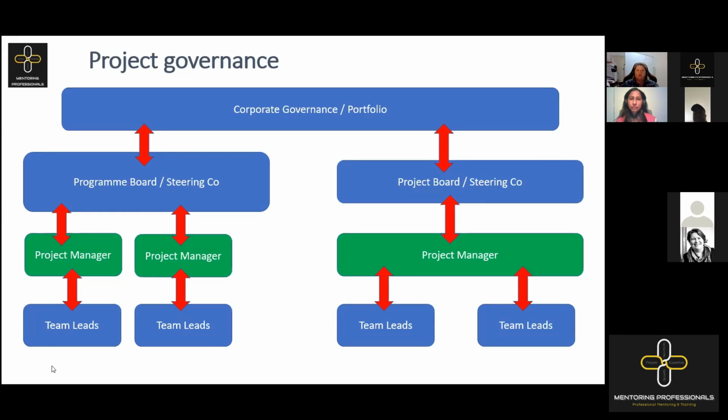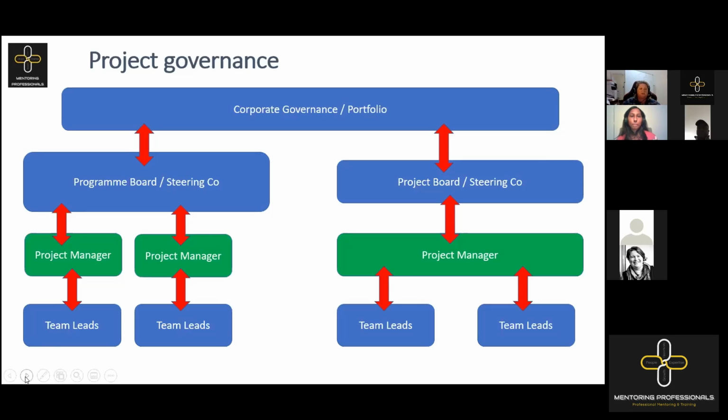Of course, in your agile world, it's a little bit more lenient. When I say it's a little bit more lenient, time, cost, and quality in the agile world is sacrosanct, which means scope is actually driven by the requirements, and we set the scope in terms of the requirements, the breadth. That is the scope that we allow the variations to come in, the depth, which means that we'll always guarantee that we'll deliver on time. We'll always guarantee that we'll deliver within the cost.